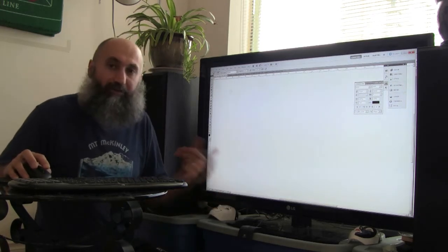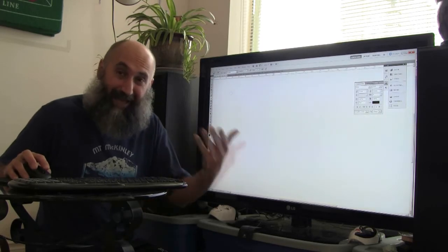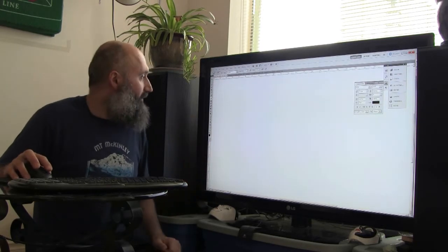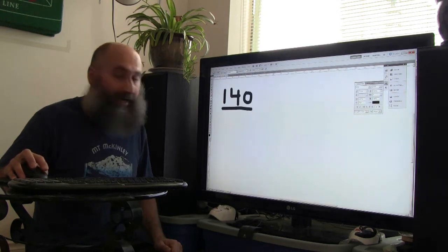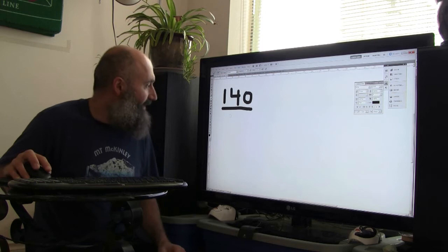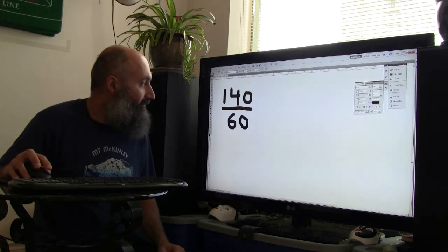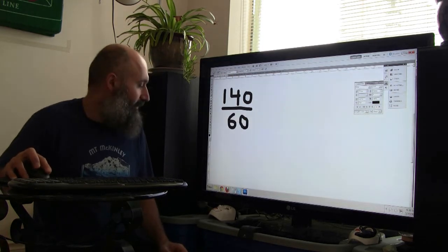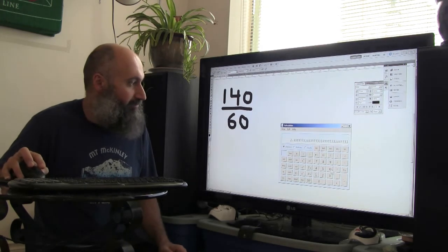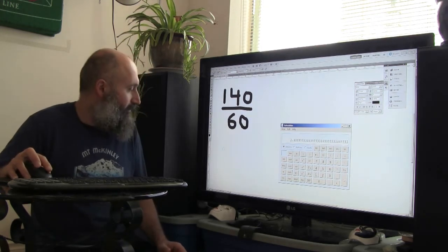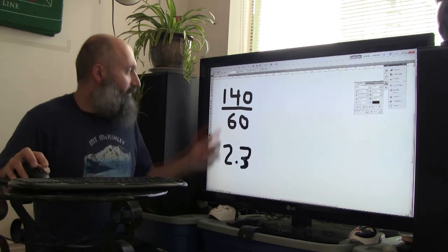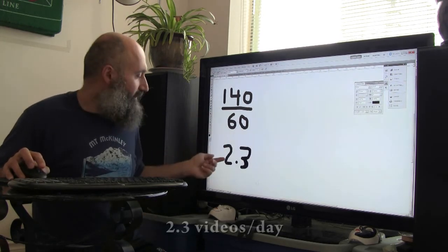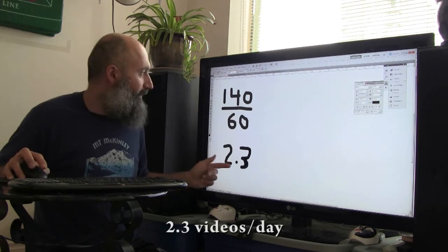Now there's 140 videos I needed to edit. So what you could do is go 140 and divide this by 60 days, and that's 2 months. So 140 divided by 60. Let's figure out what that is. That's 2.3. So if I wanted to get done in 2 months, I needed to edit 2.3 videos a day.